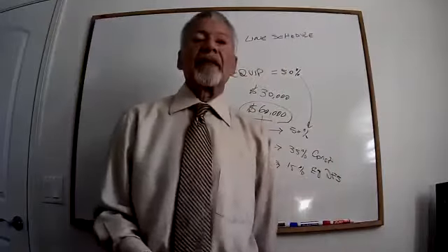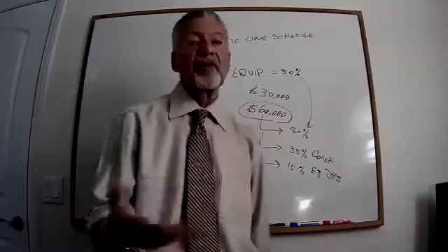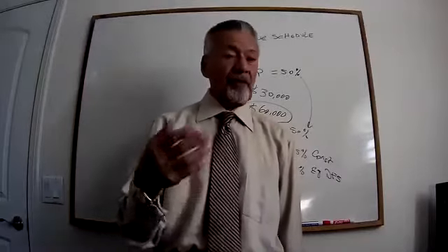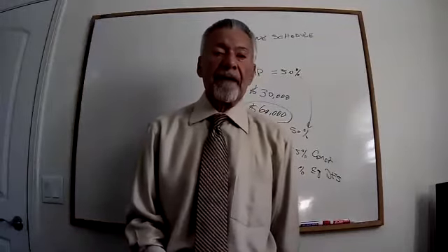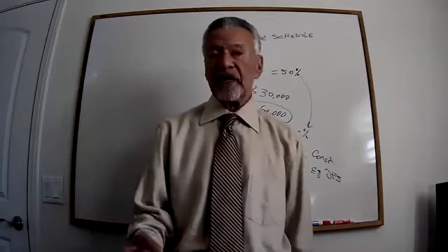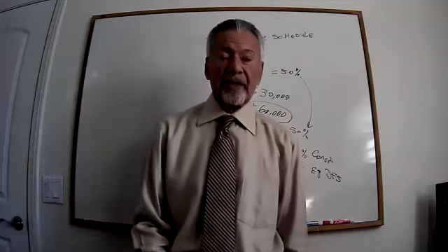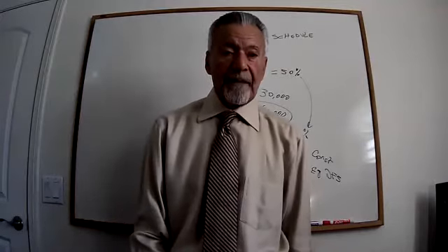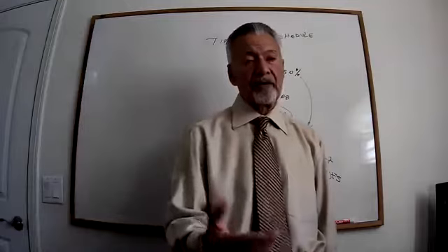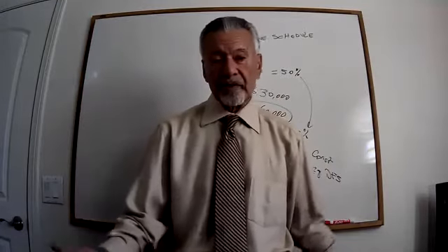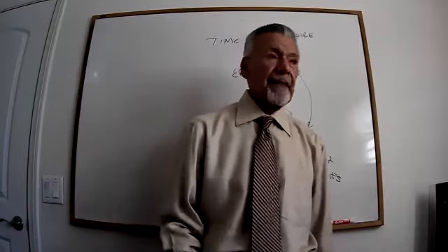Now, when you do your research, there are a lot of existing projects similar to what you're doing. And if you do the research, you can find out how much it costs them to do that. Then, based on that, make an assumption. If this project is 100 megawatt and costs $5 million, just scale it down to the 10 megawatt that you're doing. So that will be the total cost of your project. So you can do that.